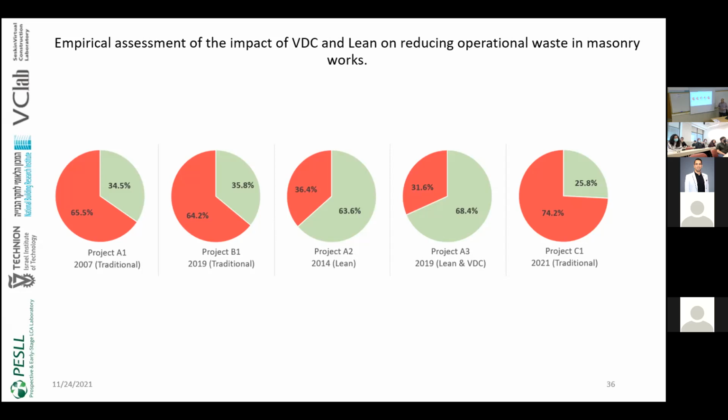So when I monitored the worker activities and used the same research methodology as in the last projects, I found that 3/4 of the workers' time is non-value adding activities, and only 1/4 of their time is value adding activities. And this is due to the waste associated with the construction method itself.